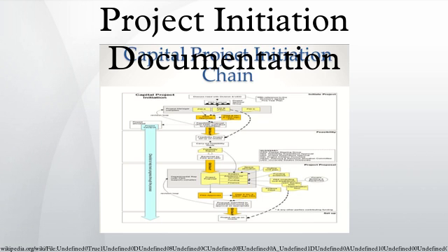Getting a PID approved. The last stage of writing a PID is the approval, which implies distribution to all stakeholders on the distribution list within the PID, and other interested parties such as operations or HR for resources, by email with a request for comments. Then the lead of the team will collect the comments and follow with a final meeting where stakeholders and interested parties discuss the PID in further detail.